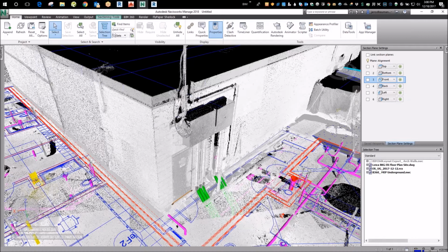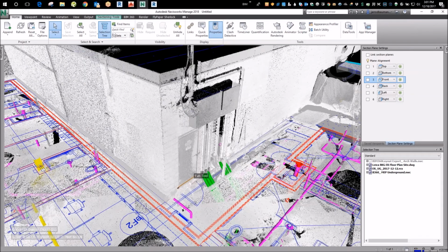Absolutely we can. Our goal is to get some people trained, and quite honestly, a few of our supers are the ones very interested in being able to use it to check things early, because that's the hardest part. Once there's enough of the building there, it's not so hard to go out there with a tape and go, dude, you blew it. Yeah. You're off, right? I can measure from this wall to that one, and I have a dimension on the floor plan. But when it's wide open dirt, that's the part where it's going to be most beneficial. Once you have enough CMU walls, you're working within the constraints now. Right. You won't need so much of it, but it's truly majorly valuable here.